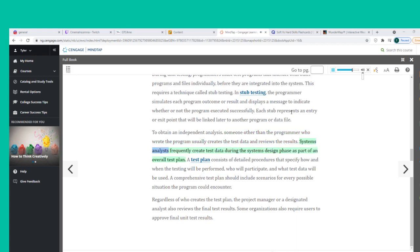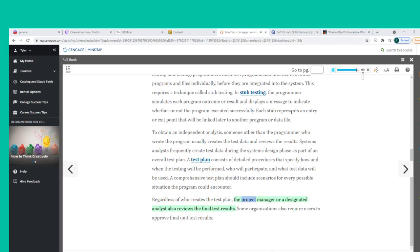Systems analysts frequently create test data during the system's design phase as part of an overall test plan. A test plan consists of detailed procedures specifying how and when the testing will be performed, who will participate, and what test data will be used. A comprehensive test plan should include scenarios for every possible situation the program could encounter. The project manager or a designated analyst also reviews the final test results, and some organizations require users to approve final unit test results.